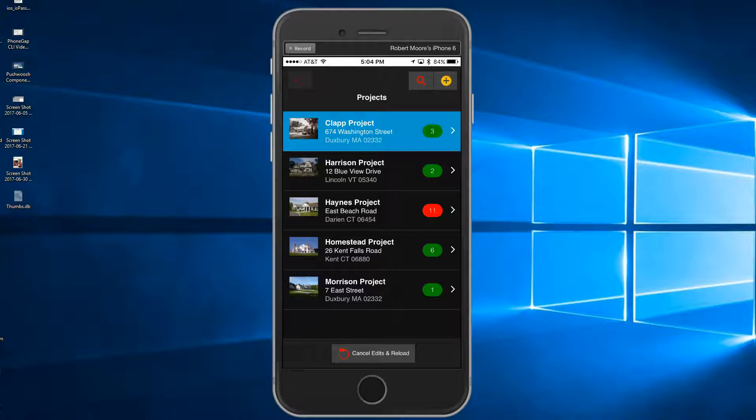The punch list is normally agreed upon by the general contractor, the architect, and the homeowner after a project walkthrough.